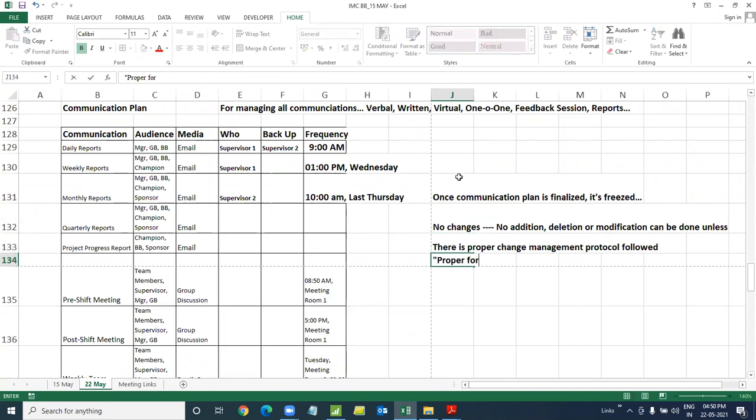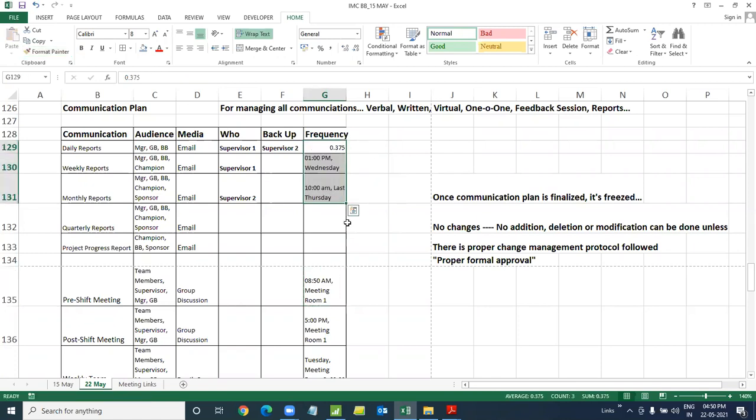Proper formal approval. Well, you want me to publish this weekly report. You are asking for this report on Tuesday. Well, if you need an extra report on Tuesday, please be my guest. Get me an approval, and I'll be more than happy to get this report published for you on Tuesday. Go and convince the management, when we're publishing this report every Wednesday, why you need an extra report on Tuesday. And if you're able to convince them, I don't have a problem. I'll get extra resource, time, money. I'll be more than happy to publish that. But for now, whatever is there, it is as it is.